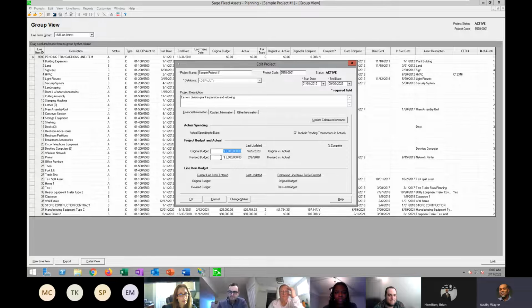This is where I mentioned you don't have to change that. So let's say, in my case, a $2 million budget that I'm approved for. As I'm going through this, you're getting all these revised estimates, labor cost overrun, materials overrun, and so on. Someone is going to be accountable for, hey, how badly are we busting that original budget, right? So this is where being able to add the revised budget, let this be the moving target. Whenever someone asks, which is probably Glenn, hey, how far off the original target are we? And how far off our revised target are we? You can even do a quick calculation here to see where that stands.